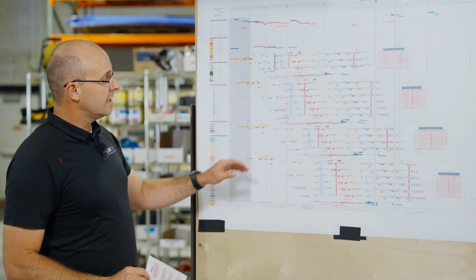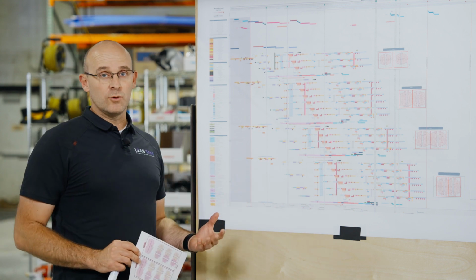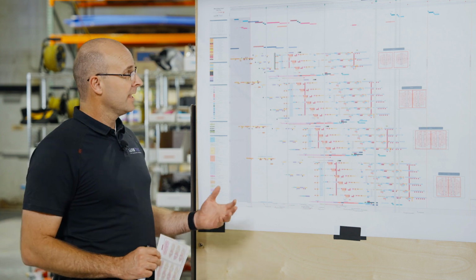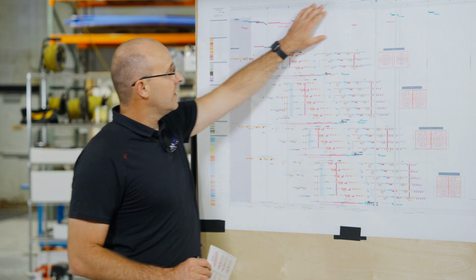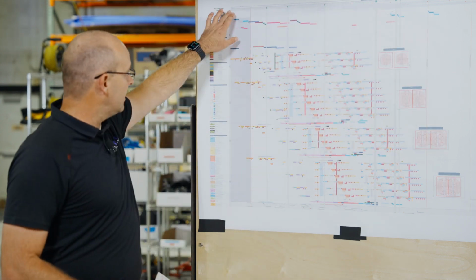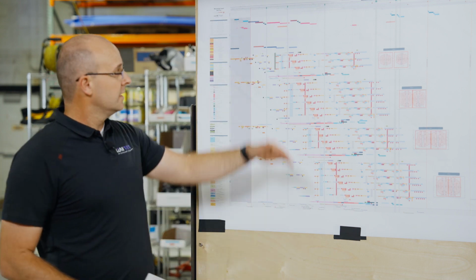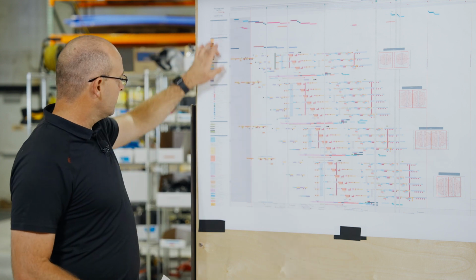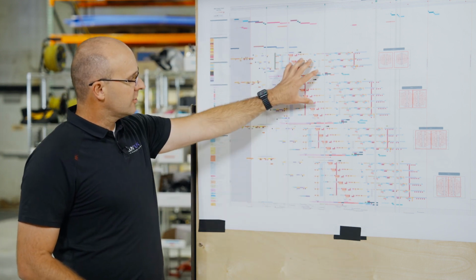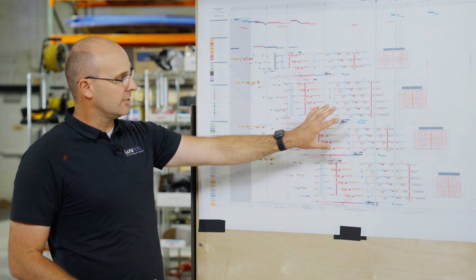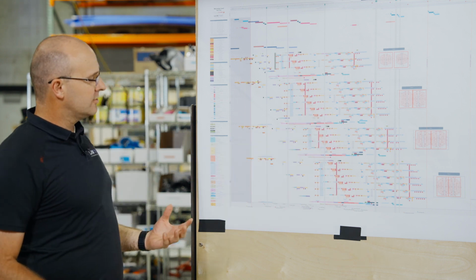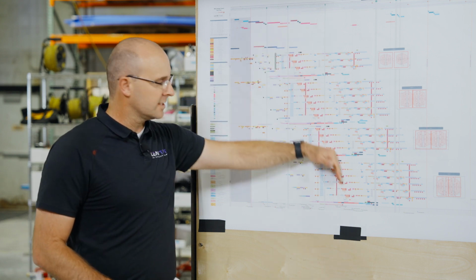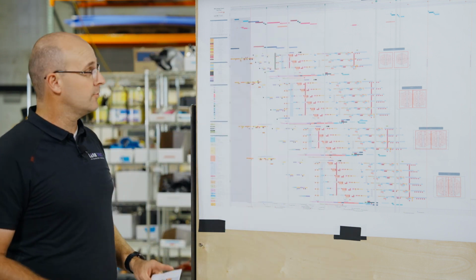Let me first say that in the previous video, we talked about how to read and understand a macro level takt plan. And I made the point that on the top you have your time scale, and on your left you have your phases and zones. It's always formatted in a time by location format with your legend to the left and your colored activities in the center with the zone maps and any interdependence ties. So you have time, location, and then process or activity. This is exactly the way it should be.